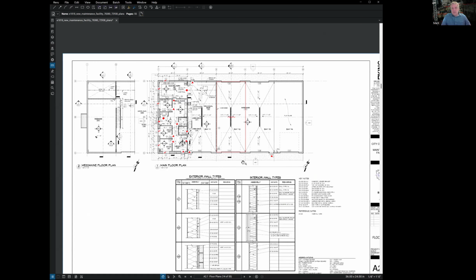Okay. As long as it's ground level, I'm pretty sure I can finish a deck that is 100 square feet in 2 days. All right. Then you go out and you test it. You prove whether or not you can do it, and you make sure you're tracking your time, and that determines your production rate. So until then, you're guessing.